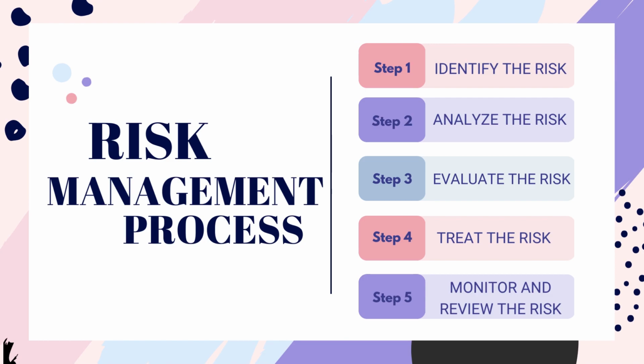Risk management process. It has 5 steps. The first step is identify the risk. Second is analyze the risk. Step 3 is evaluate the risk. Step 4, treat the risk. Step 5, monitor and review the risk.